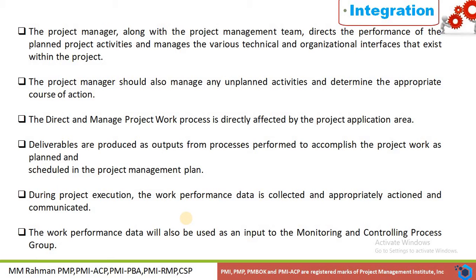Deliverables are produced as output from this process and performed to accomplish the project work as planned and scheduled in the project management plan. During project execution, the work performance data is collected and appropriately actioned and communicated. The work performance data is also used as input to the monitoring and controlling process group.